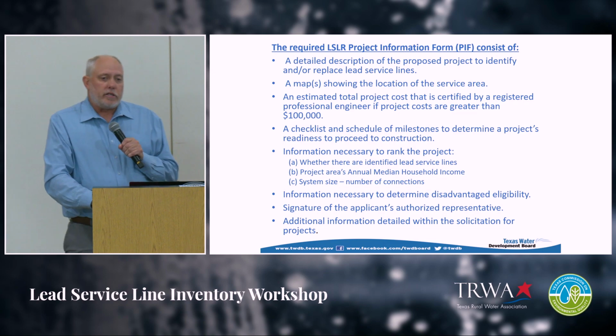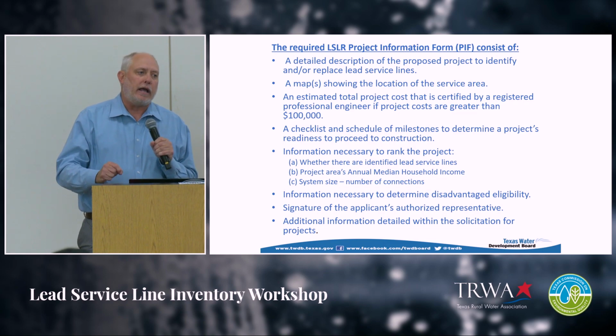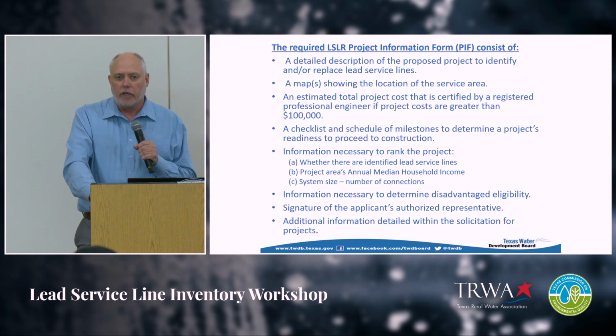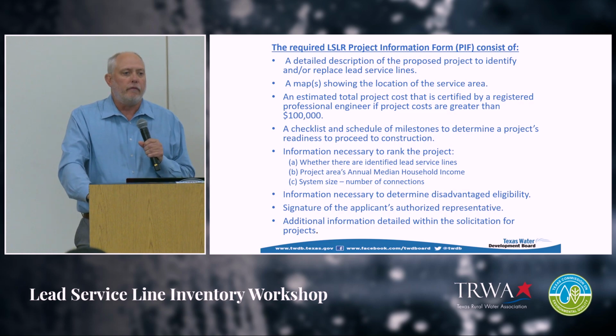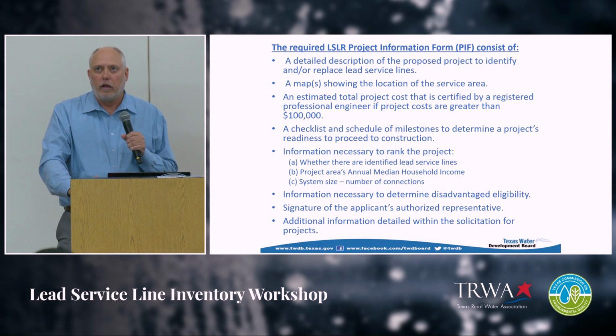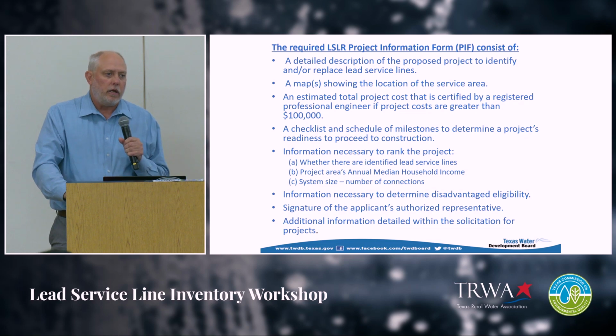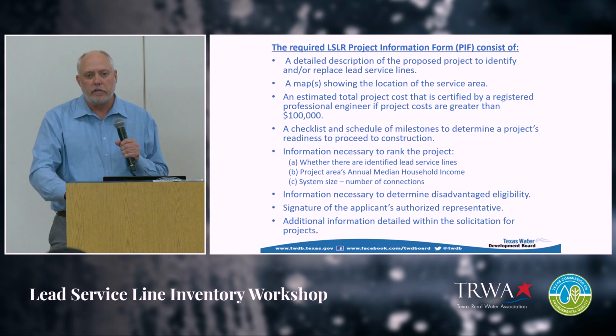One thing that the project information forms have, typically they're signed and sealed by a professional engineer. However, we are extending that date for sign and signature from a PE until the public comment period in the middle of July, because again, it's a tight time frame. But it does have to be signed and sealed if your funding application is over $100,000.